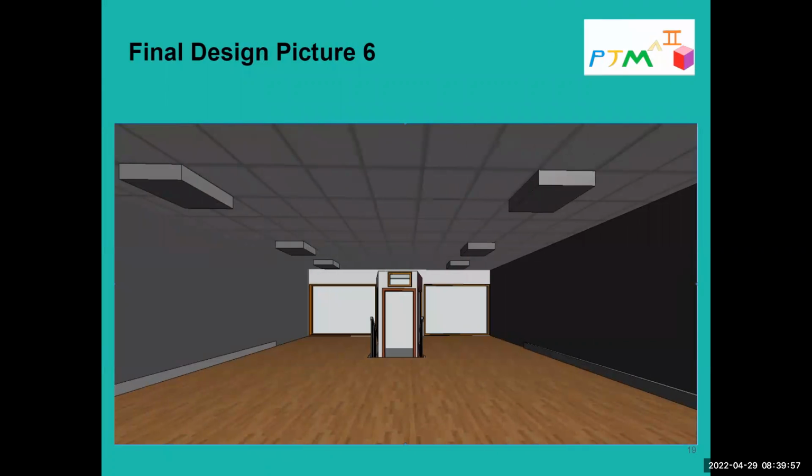This is just showing a shot of the antique shop looking out. That's one thing too that we kind of look back on, and we realized we made a mistake on, was ADA compliance. So with this antique shop, you see the stairs, we're going to switch over to more of a ramp style, to make it easier for people that are in that situation.